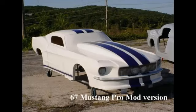Measurable details. The initial budget didn't allocate funds for a rear wing. After testing, data shows a custom-designed rear wing, estimated at $12,000, would provide the necessary downforce increase of 500 pounds at 150 miles per hour.